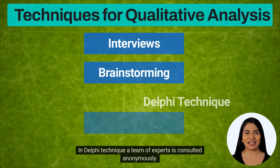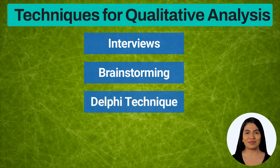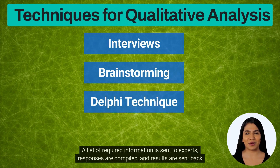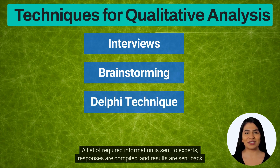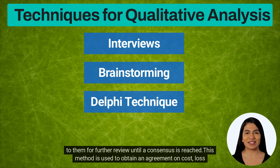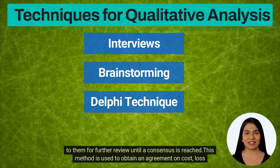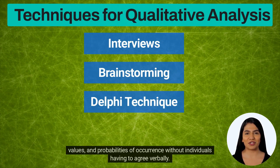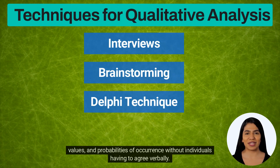In the Delphi Technique, a team of experts is consulted anonymously. A list of required information is sent to experts, responses are compiled, and results are sent back to them for further review until a consensus is reached. This method is used to obtain an agreement on cost, loss values, and probabilities of occurrence without individuals having to agree verbally.